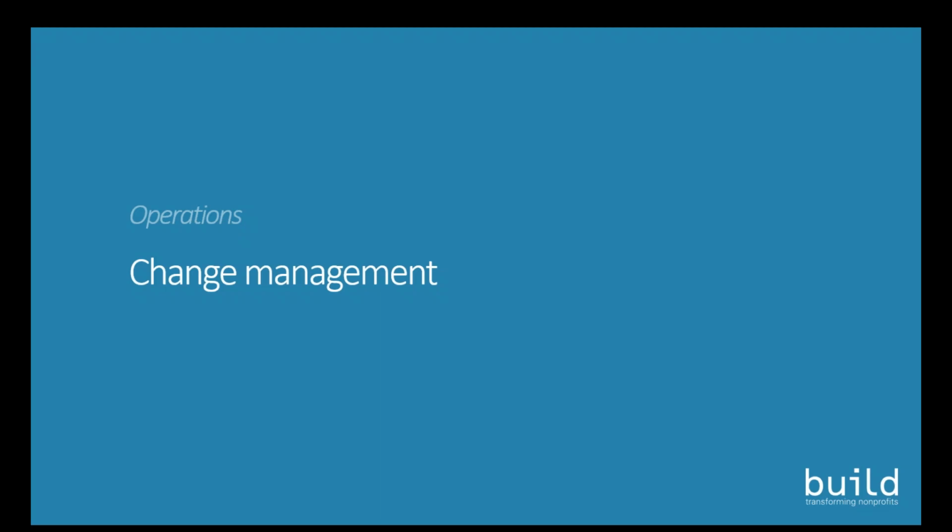I've been referencing a lot the resources on our site, and I'll continue to do so. We actually have a how-to tool and template for performing a change impact analysis for your project in the resources section of our website, along with the information strategy white paper that I mentioned earlier. It's one of our most downloaded resources. And as you'll see in that template, effective change management incorporates four critical elements: leadership alignment, communications, training, and then also support. In that template, training and support are bundled together as concepts. I'm calling them out a little bit more individually today for the sake of example.